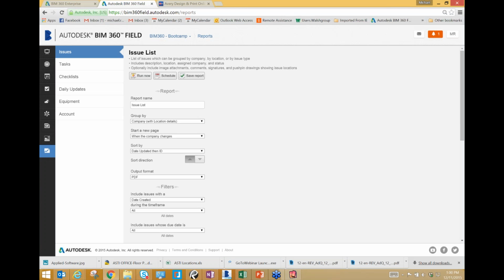Gotcha. Thank you. I think you touched on this a little bit at the beginning when you said that you had gone ahead and set up your locations, but how long does it typically take to set those locations up so that they can be linked? Sorry about that. It depends on how big your project is, but I think it would take probably less than a half hour to set up one floor, and that includes making the list, putting it into the locations template, and then cropping everything.